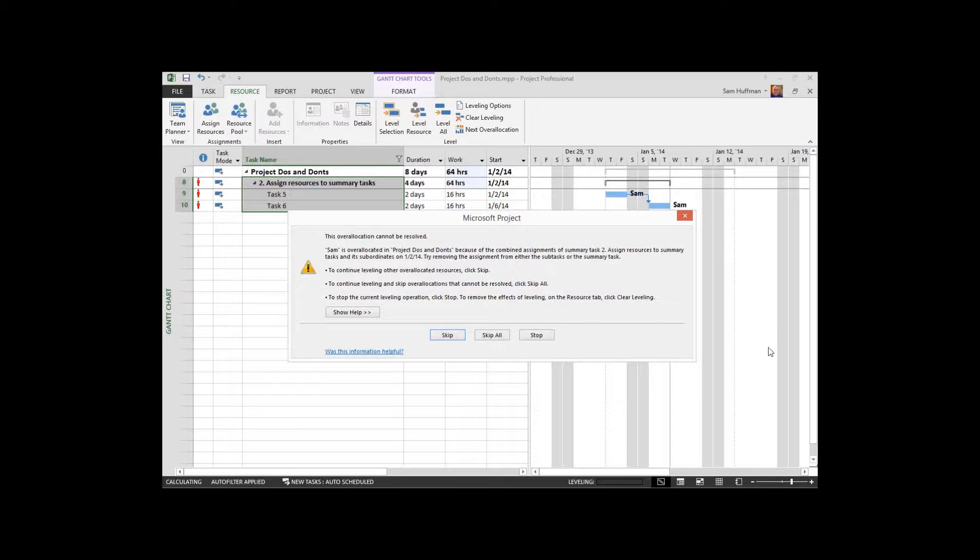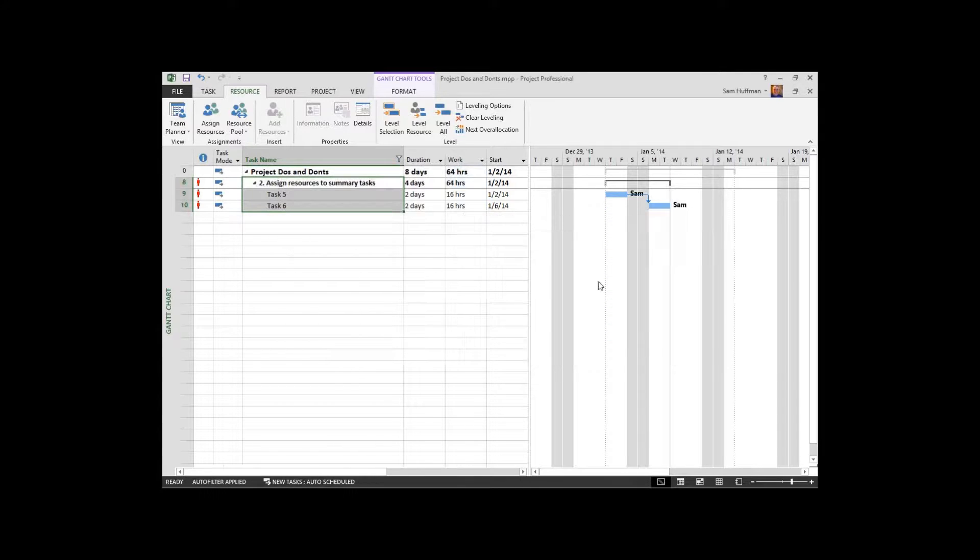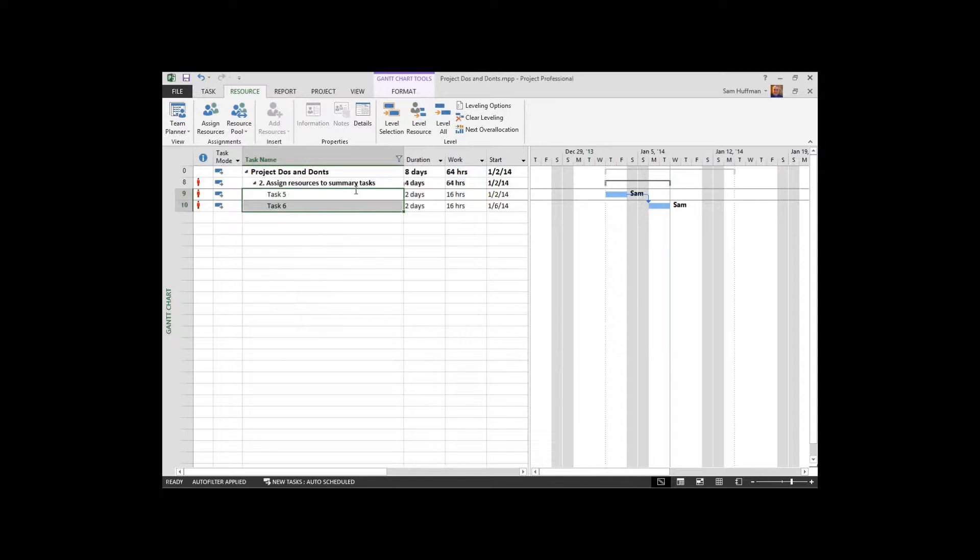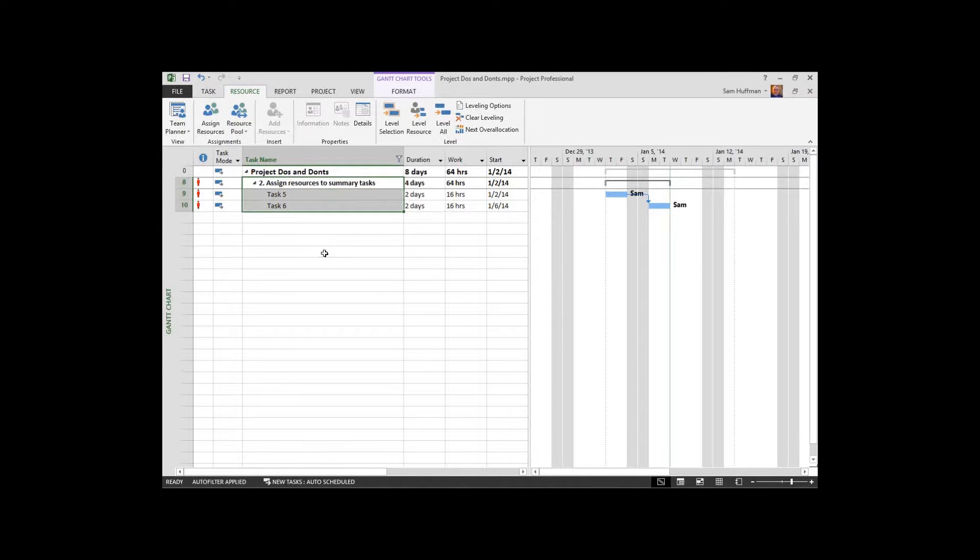Assign resource to summary tasks and its subordinates. Try removing the assignment from one or the other. Now what this is saying to us is assign your resources here or assign your resources here. But the error situation is when you assign the resources to both.